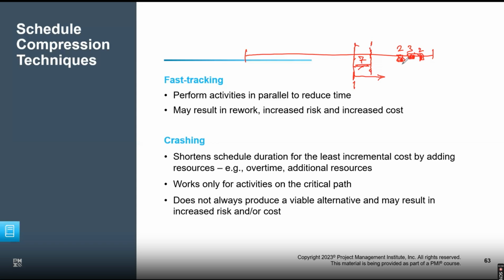So I will get some extra people who will end up doing this work for 7 days before those activities. If those activities can be preponed, I will have an extra team involved and this team will do the job. So by the time I reach here, I will see, okay, I don't have to do this 2 days work. So I will cover up the gap. When I again do the job, I find the 3 days work is already done. So I have covered up the gap. Again, I find out 2 days work is already done. So there's a parallel team working and covering up the gap, which is supposed to happen in the future. They will get it done in parallel. Now there is a risk because you're doing the work well before time.